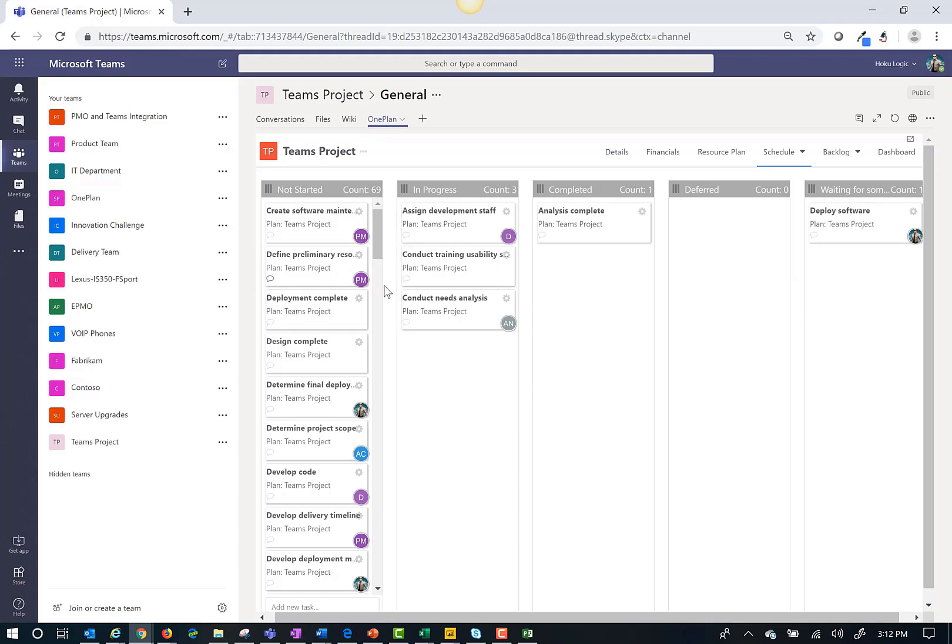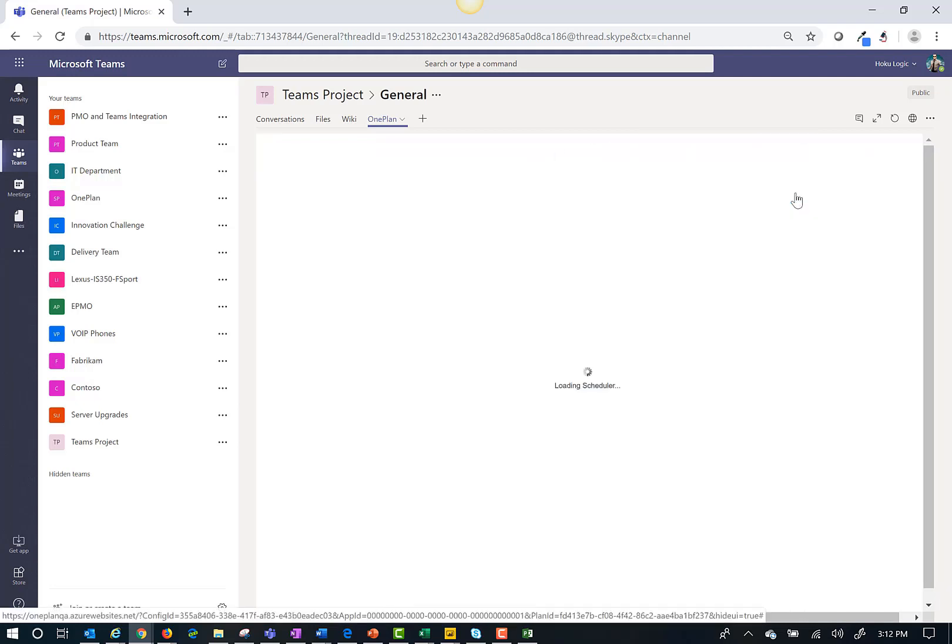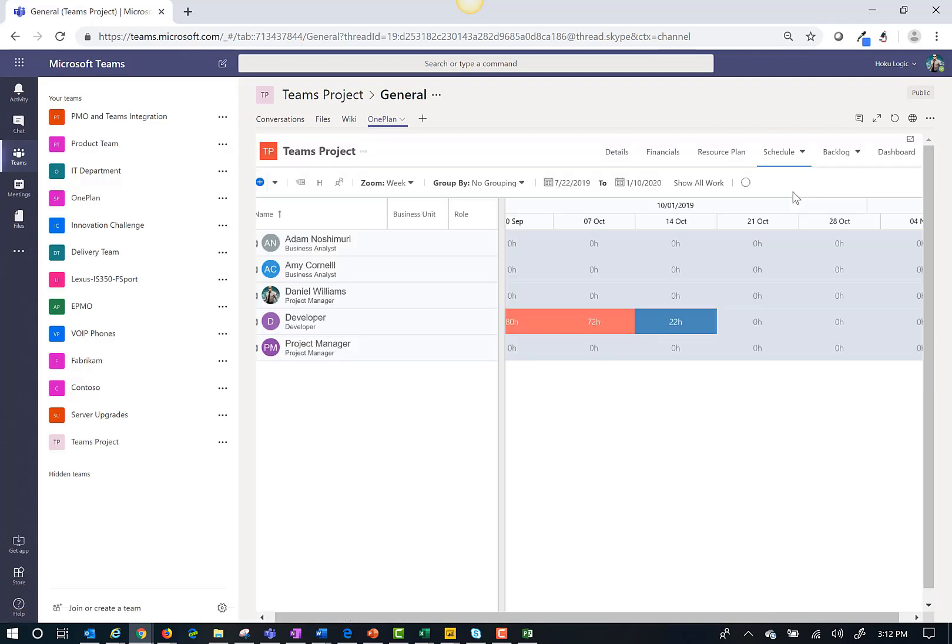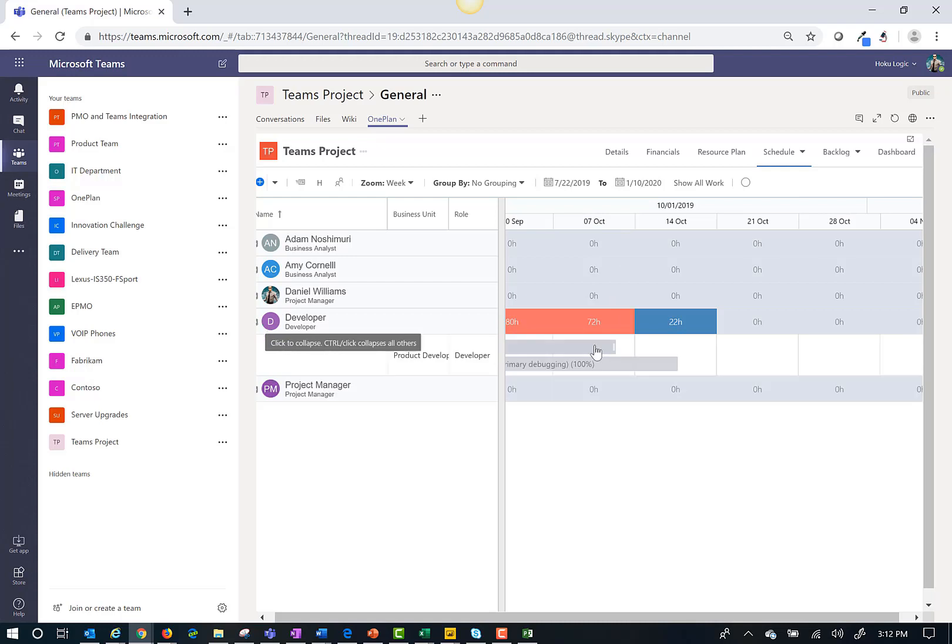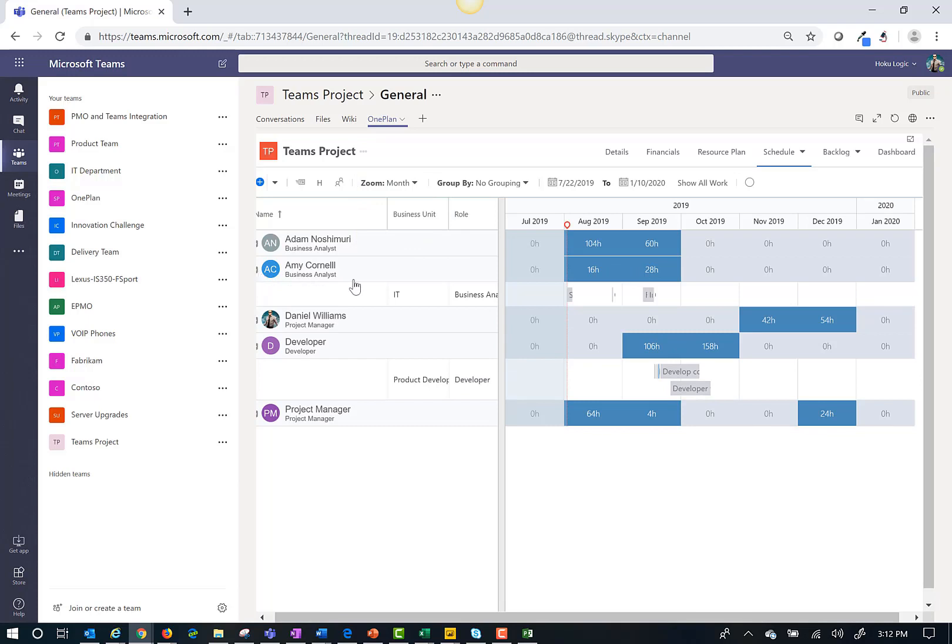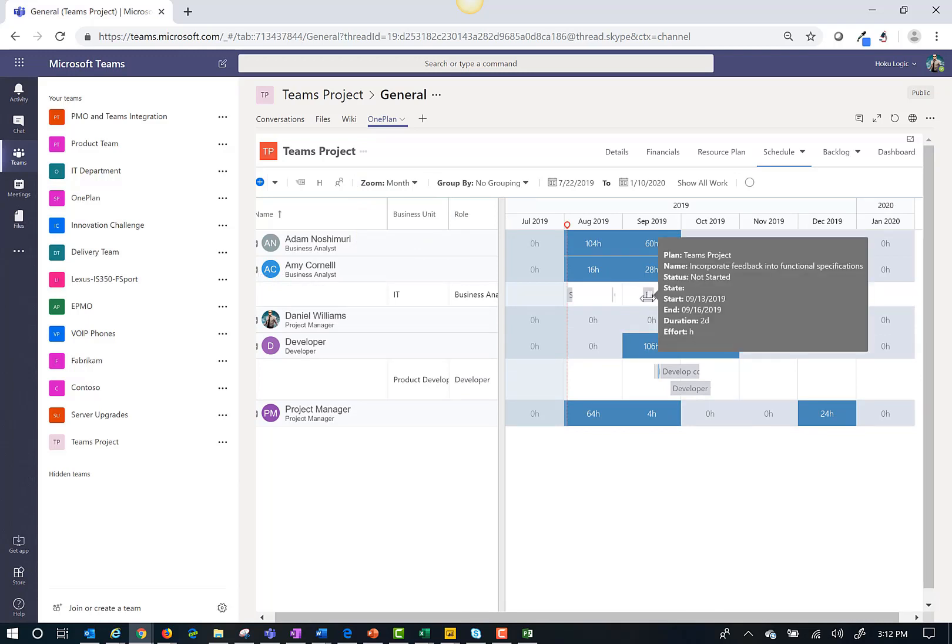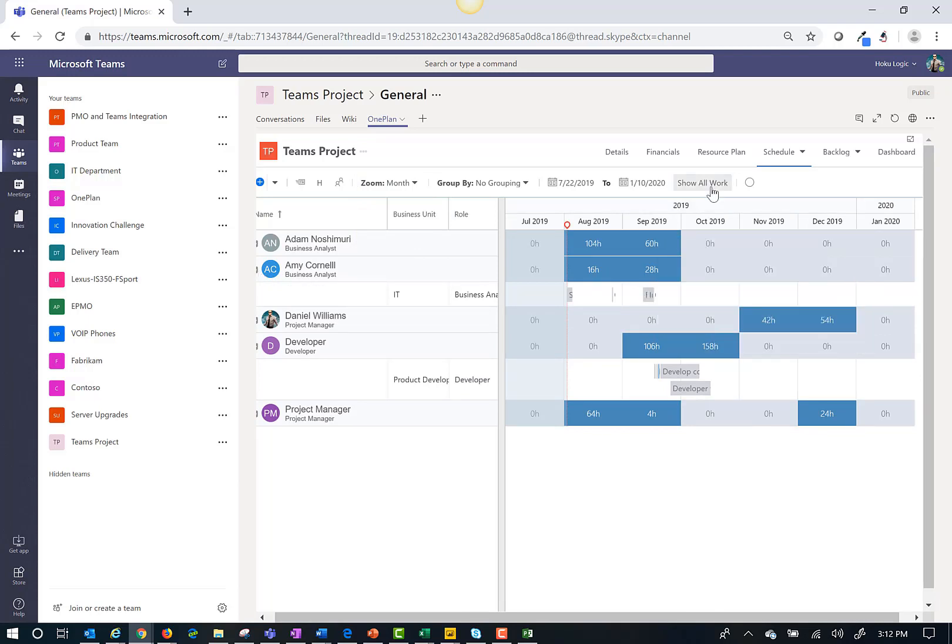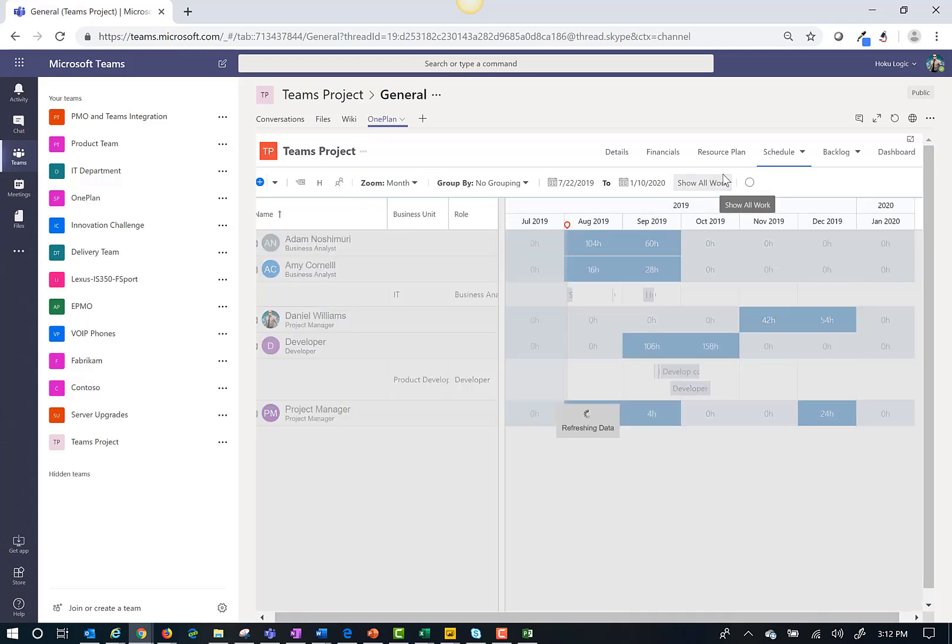Another feature with a project published to Teams is that I can get a view of my resource load. Here I see the work assignments for each resource for this project. I can change my zoom and get more details as I hover over an item.